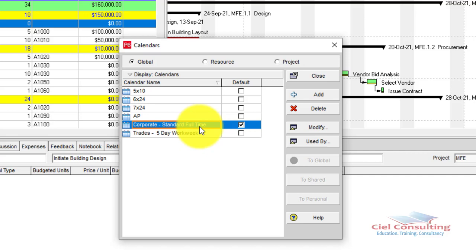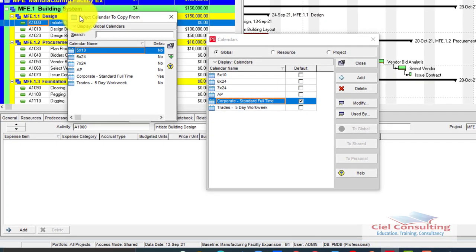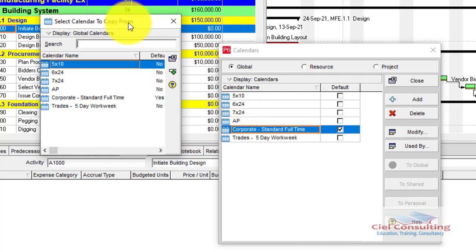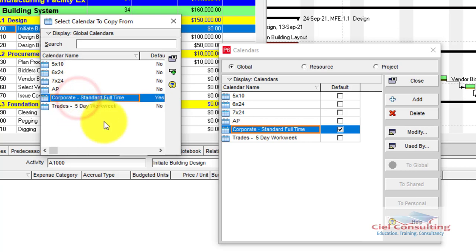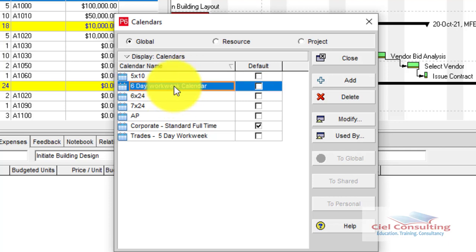In this exercise, we're going to create a six-day workweek calendar — working six days a week, Saturday inclusive. Click the Add button. The 'Select Calendar to Copy From' window appears. We'll copy the Corporate Standard Full-Time Calendar, click Select, and then type in the new calendar name: Six Day Workweek Calendar. Hit Enter and the new calendar is created.